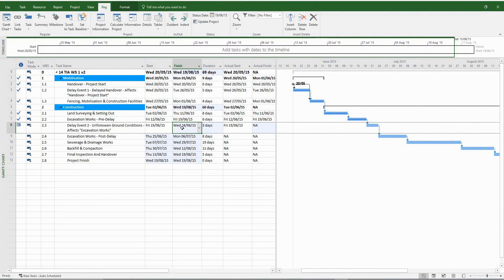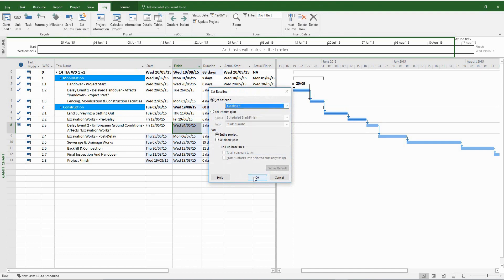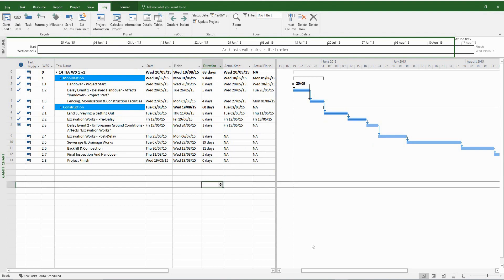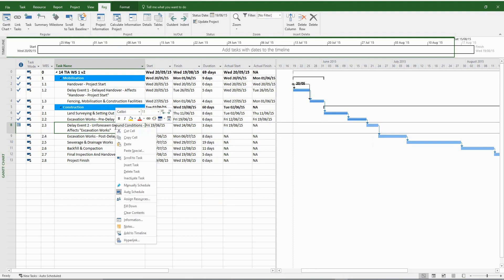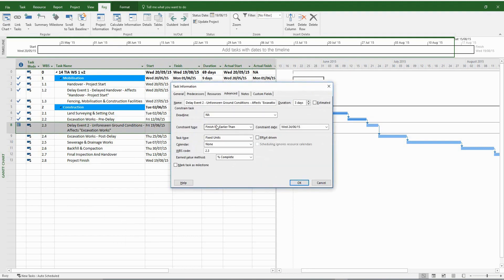Once this is done, we have to save the next baseline, which is baseline number four — post impact. And there you have it: you have successfully impacted the program with your second delay event. One last step is to remove the constraint from delay event number two and ensure that there is no change to the project finish date. Everything looks good, and now we're ready to move on to the next delay event.